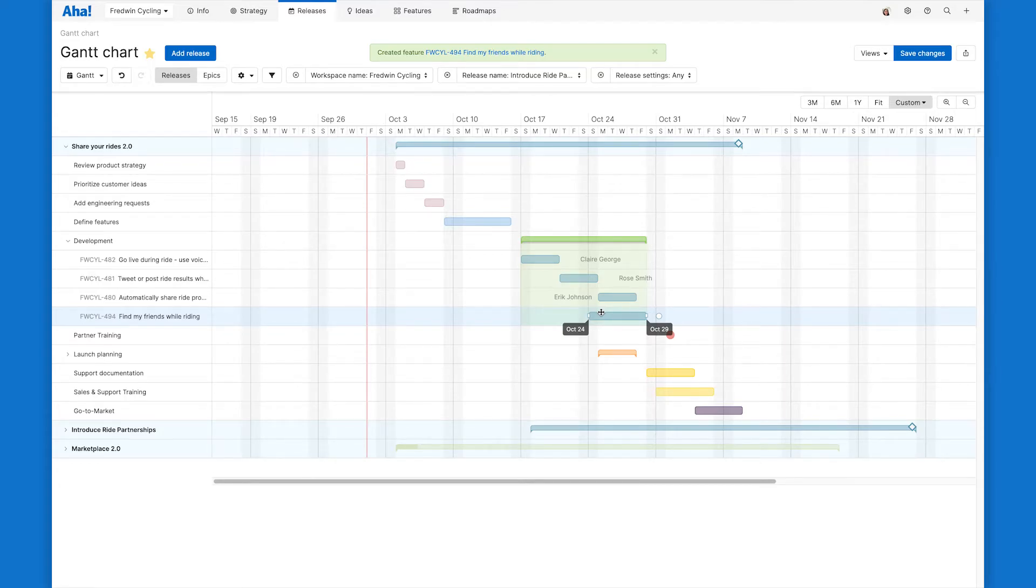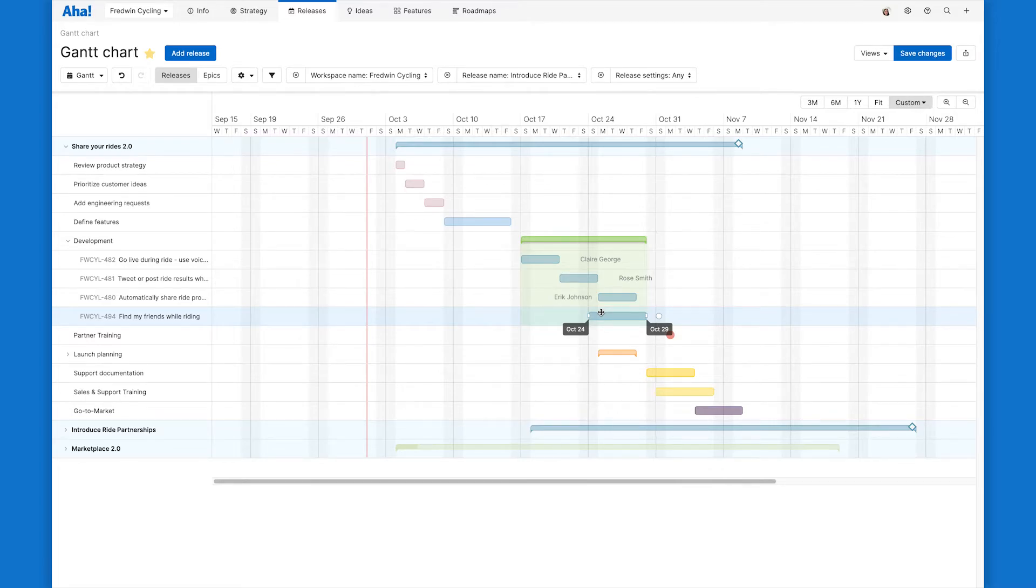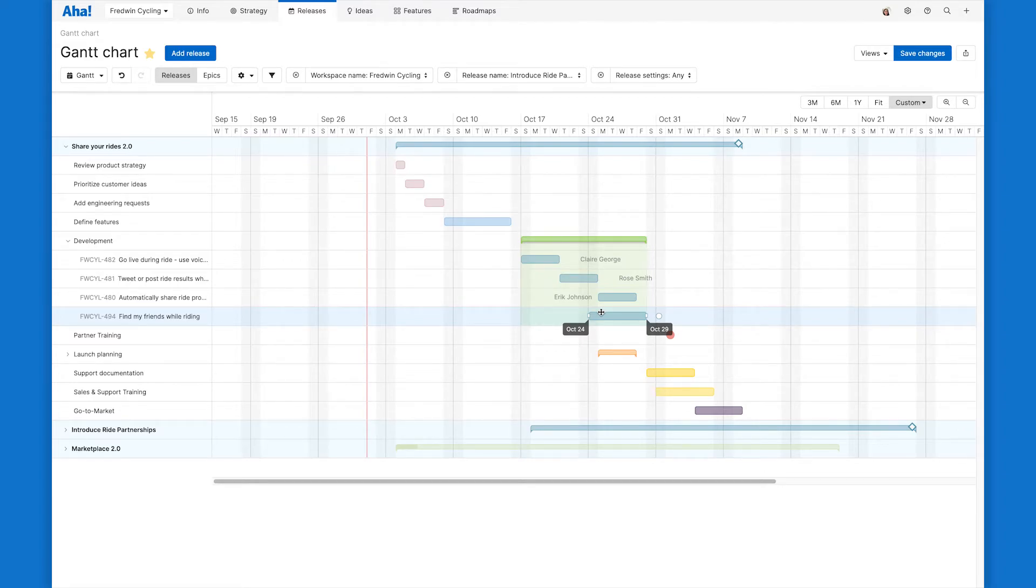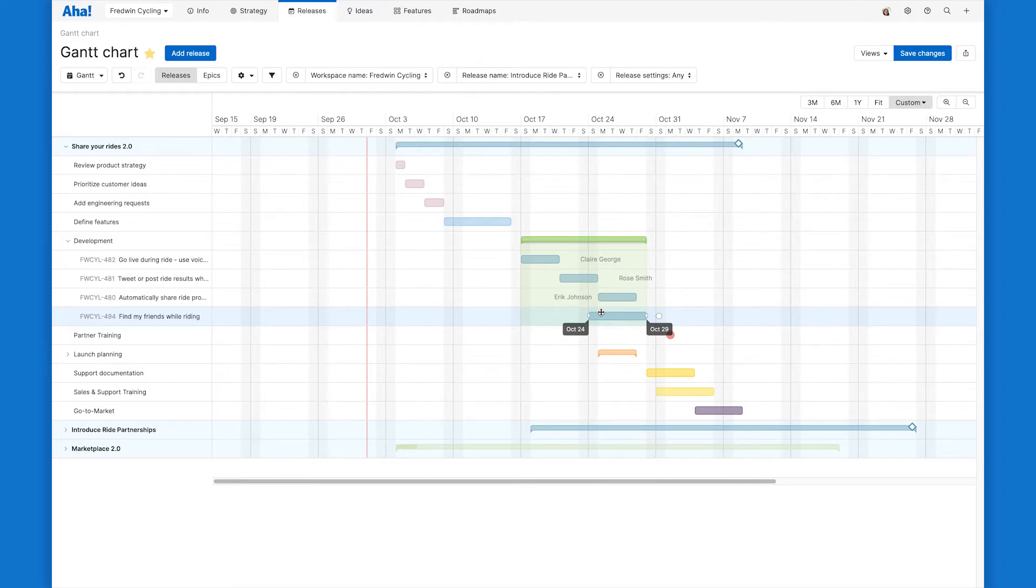Okay, so now that I've got my visual plan in place for all the things that have to happen as part of my release, it's time to talk about how to manage dependencies. As I look at my release, I can see that there are a few things here that are dependent on other work before they can begin. I want to show that on my plan so that everyone on the team has visibility into it and so that we can really understand the impact to our overall timeline when dates start to slip or we have delays.